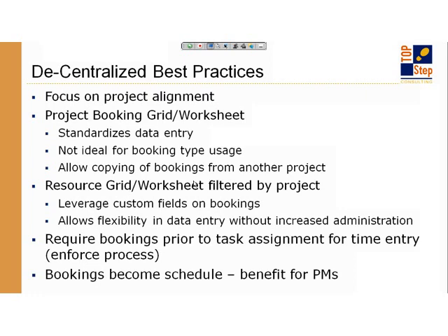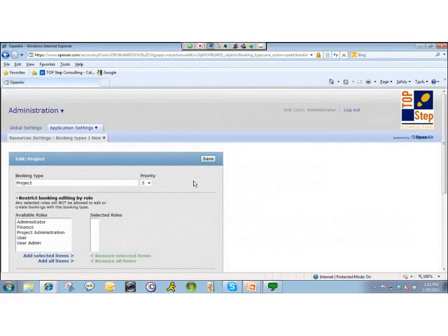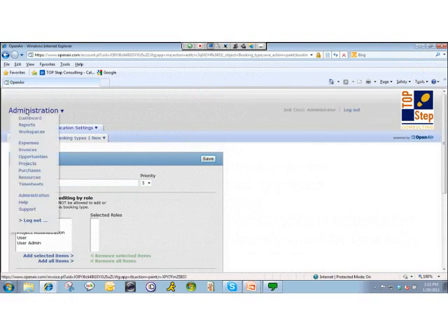So now, looking at it this way, as project managers are creating projects and copying projects, they not only can copy the project tasks and the billing rules and everything that you've set up on your templates, they can actually go into the project booking grid and copy a standard resource plan from your templates. And so let's take a look at that because that's something I'm discovering a lot of people are not aware of in the system.